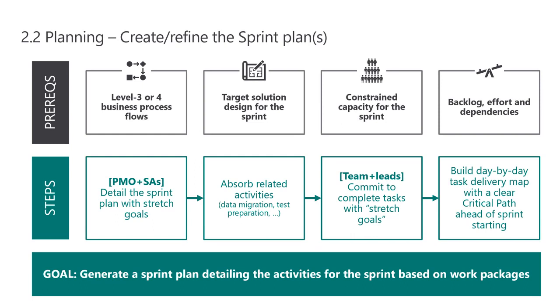I can see that the sequence of processes we're going to deliver makes sense. From a technical perspective, it's got the right dependencies. I'm creating the right objects before I rely on them in the next sprint, and so on. And you add some stretch goals in there, and it's important you add those stretch goals, because in projects things happen, right? You can end up with a process that just gets blocked. You can't make progress on it because of something unforeseen.